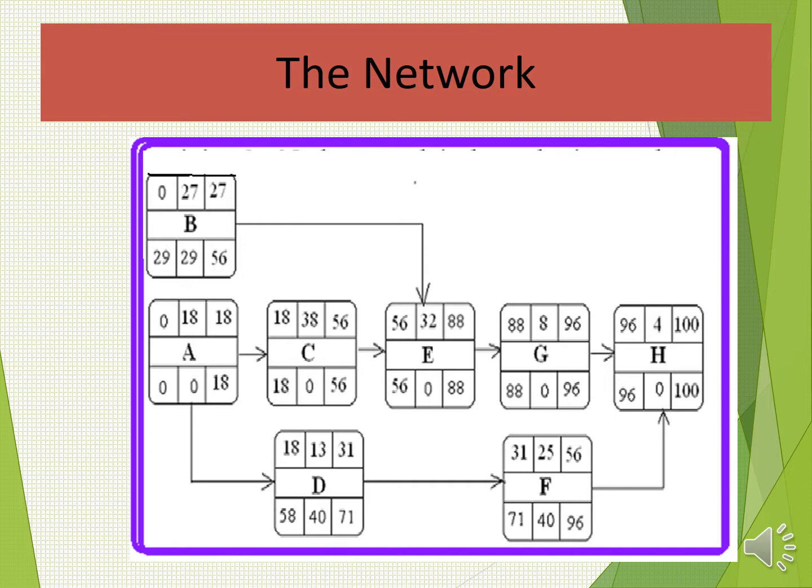And then we roll backwards the project; the latest times are what we shall use to calculate the slack. And this gives us, by now you see what the critical path is, where there is only slack 0, and the total duration is the same as the completion of the project, which is 100. And so this is S, C, E, G, H.